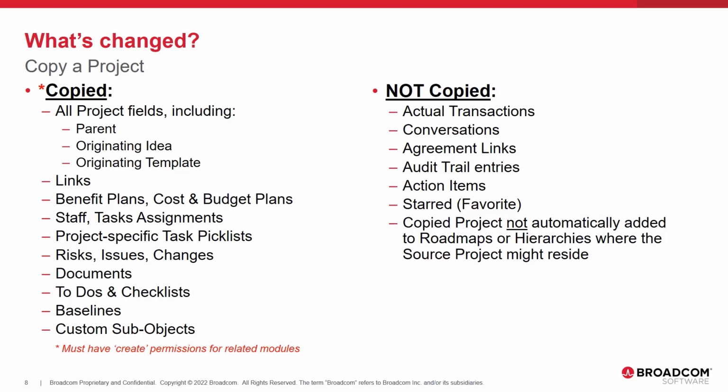Using the copy also preserves some data that is not done when creating a new project from template. Dates are retained in a copy versus a template where the user can specify a new date range for rescheduling the project. The status or state of tasks and assignments are copied over without resetting them to not started. To-dos due date, open, completed, and block states are copied over as is.